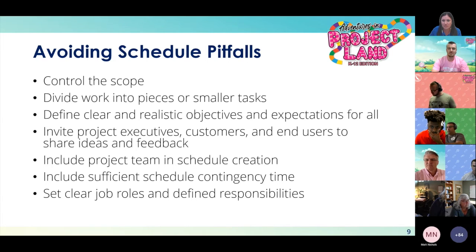Include sufficient schedule contingency time, accounting for delays and unforeseen issues. Larger, more complex projects require more contingency time. Contingency time should not be built into every task, but kept as a reserve and used as needed. We know that if we give people that extra time, they're going to use it, and that's not the idea.